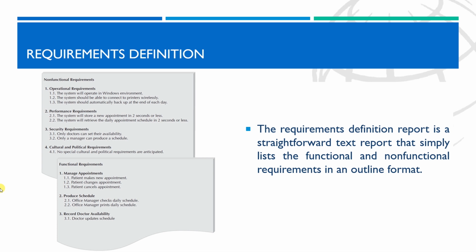Sometimes business requirements are prioritized on the requirements definition. They can be ranked as having high, medium, or low importance in the new system, or they can be labeled with the version of the system that will address the requirements. This practice is particularly important when using object-oriented methodologies, since they deliver a system in an incremental manner.